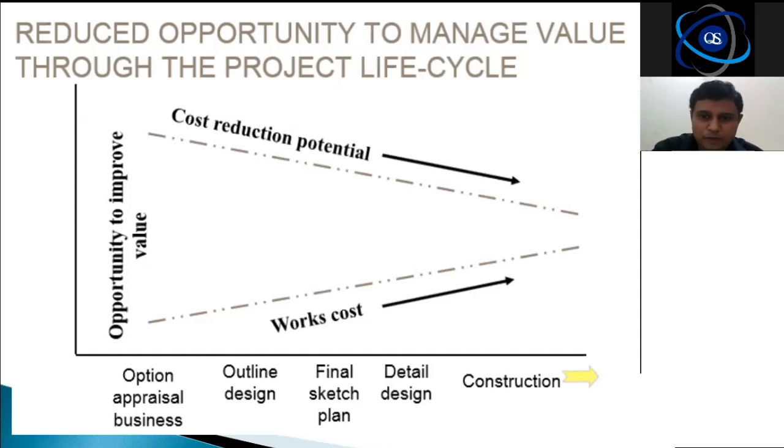But if you are at the construction stage and the contractor has already started fabrication of the required cement sand blocks, it is an utter waste for you to think about another value engineering option. That is why this cost reduction potential goes down with time. This is a very important thing that you need to understand when you are talking about value engineering. The opportunity to do the cost reduction diminishes with time. So this is one of the inherent features of the value engineering